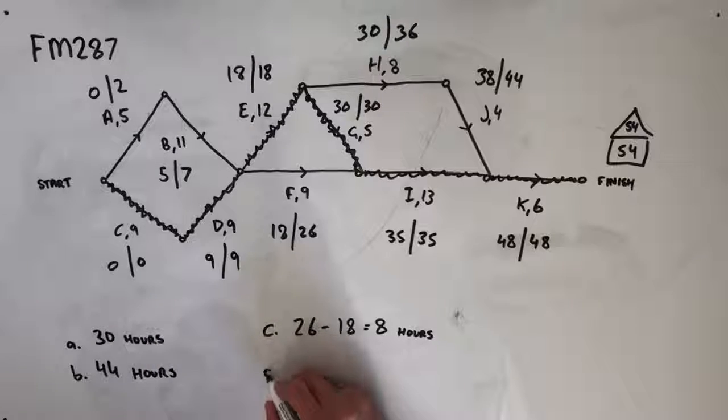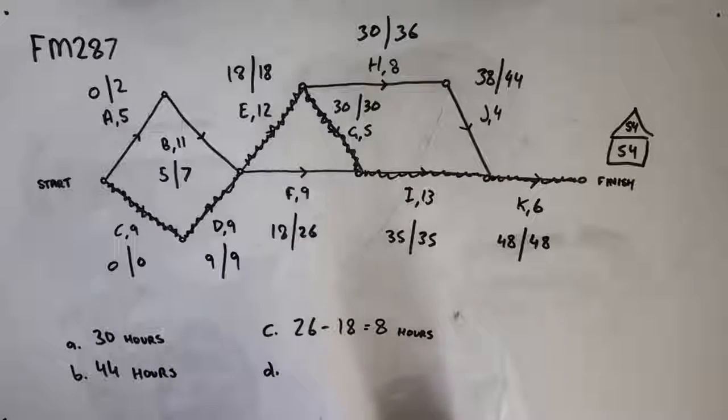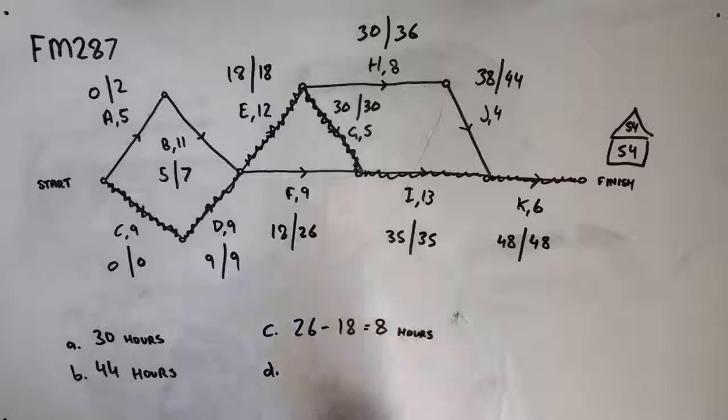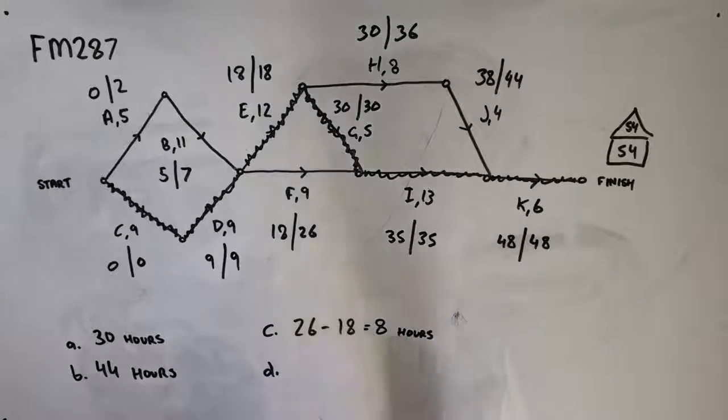We're given a little bit more information here. We're told that just before they start preparing for the function, the committee members realize the need to add another activity, Q, to the project. Activity Q will take 12 hours to complete. Activity H is the only predecessor to activity Q, and activity Q finishes with the project.